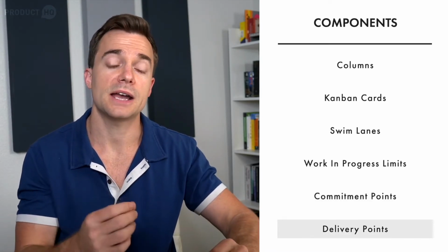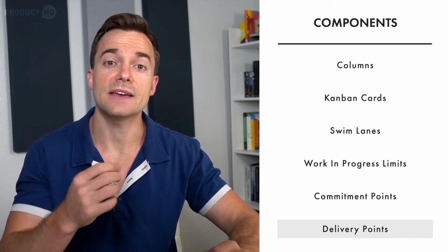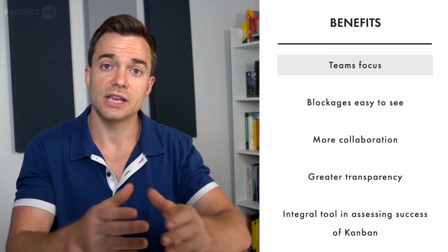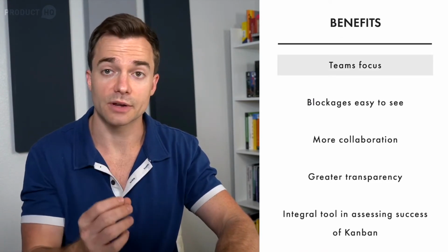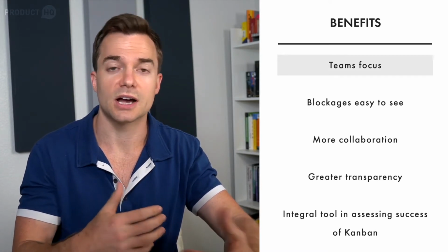The purpose behind the Kanban board is to help reduce the amount of time it takes to get from the commitment to the delivery point through visualization. And there are clear benefits of having tasks visualized on a Kanban board this way. Teams remain focused on getting tasks to the delivery point, and they aren't starting new tasks that take away valuable resources and cause bottlenecks.